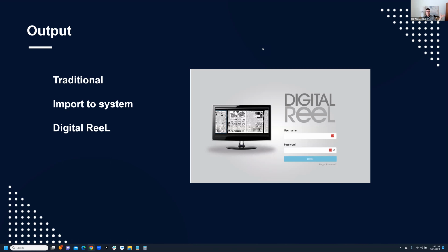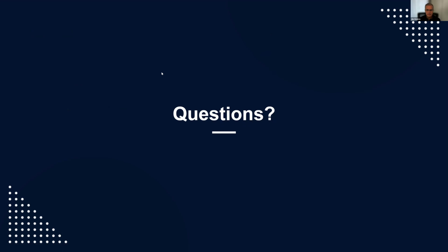The issue becomes when, let's say you want digital reels, the big project is done and everything's finished. Now you say, hey, guess what? I also want these as TIFFs. We can do that, but now it wasn't part of the process flow, it wasn't how we built out the project. So it's almost like a mini project in itself to get those to you. So if you do want multiple outputs, it's good to know that as early as possible, preferably when we start the project.